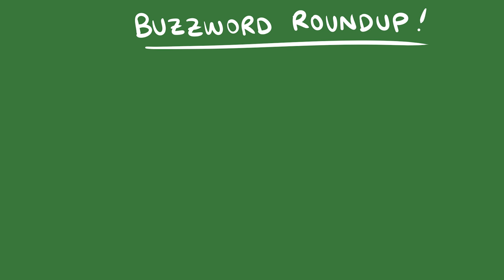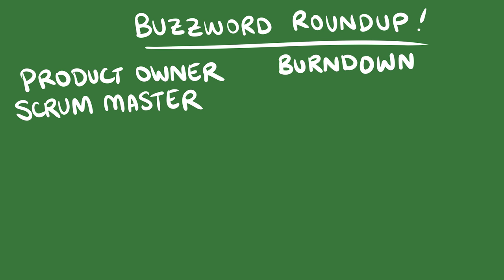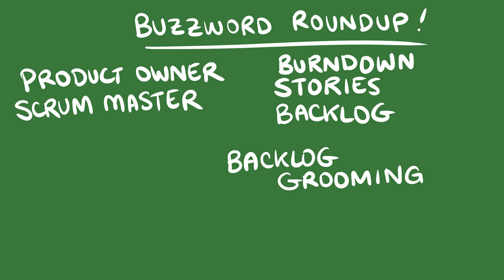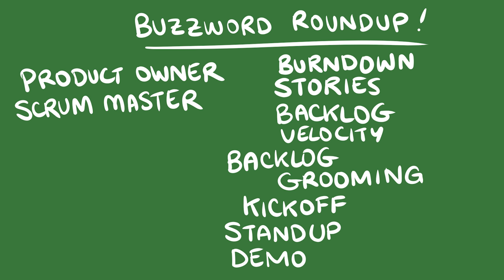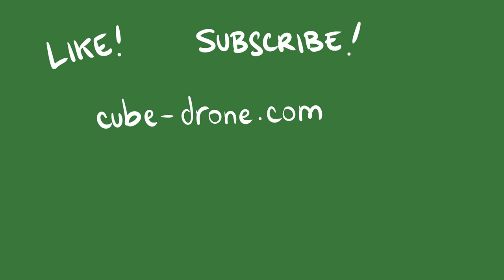Okay, so, buzzword roundup. The product owner helps prioritize and generate stories. The scrum master generates the burndown, reminds everybody of the rules, and often sends sassy emails. A backlog grooming is a meeting for generating, prioritizing, and cleaning up stories, which form the backlog. A kickoff is the meeting at the start of an iteration to estimate stories, and then you use your velocity to commit to a set of stories in the backlog. You know what a standup is already. A demo is where you show your features to the team and the product owner, and a retro is where you talk about what worked and what didn't. You update your velocity, and you celebrate with donuts. So thanks to my awesome summarizing skills, you too should be prepared to defeat bureaucracy in your company with seven mandatory meetings per week. Thanks for watching! Remember to like, subscribe, and check out my comic at cube-drone.com.